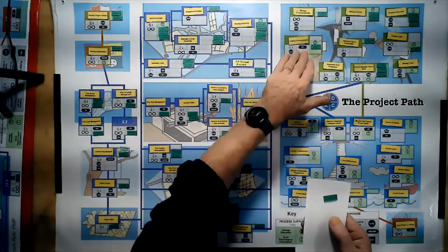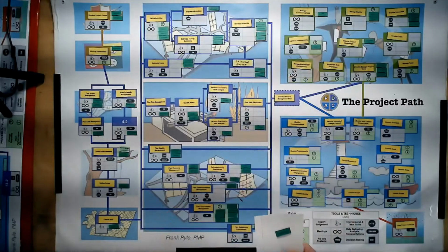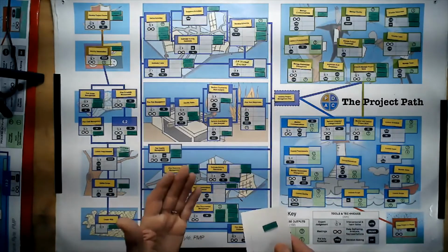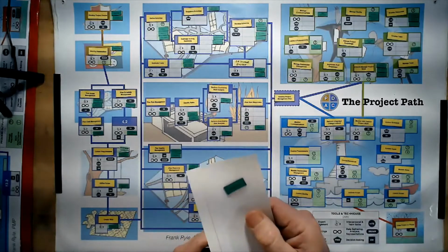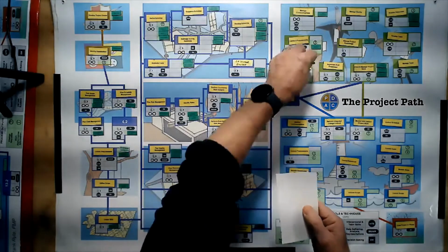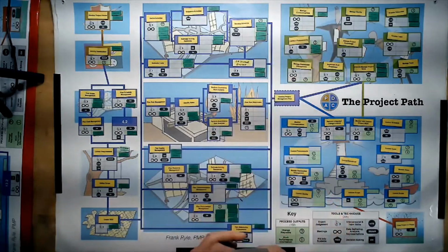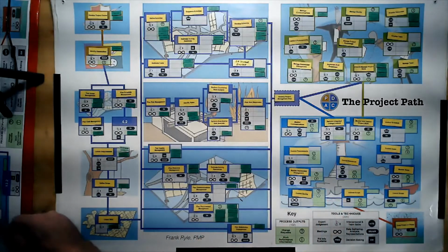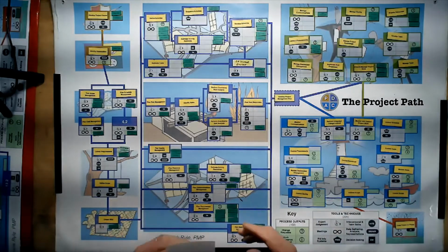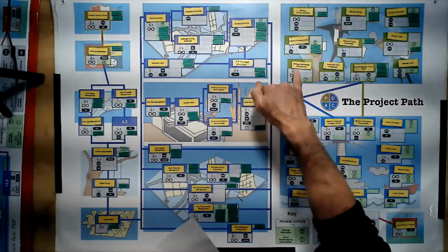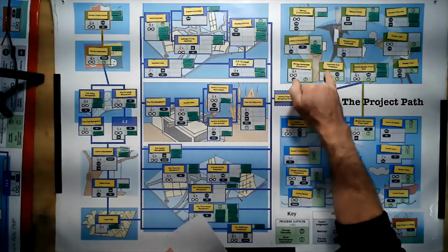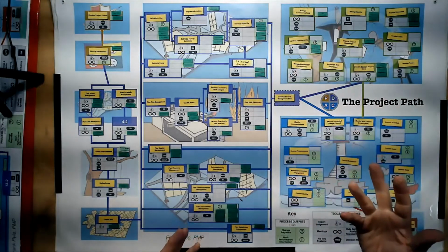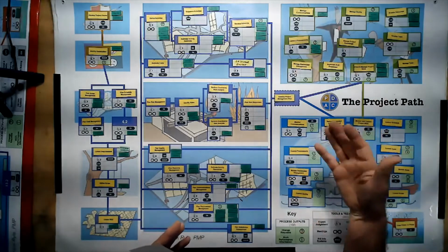The main thrust of conducted procurements is to carry out the bidding process, to select the vendors and to have these agreements. So the output is agreement. And we have the selected sellers, so we'll have a list of those, and we know who we're buying from. And so you can see now as we look around that we have a change request coming out of stakeholders, a change request coming out of implement risk responses. And so there's no other outputs. So it's an interesting one. There's not a huge amount of outputs.